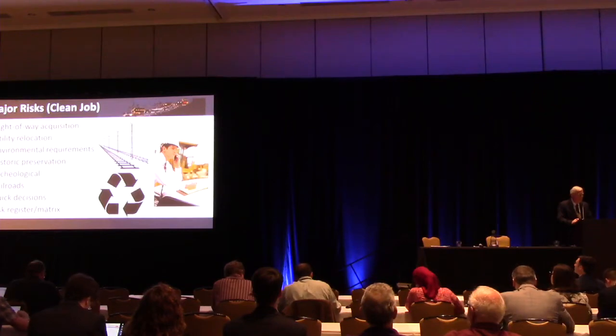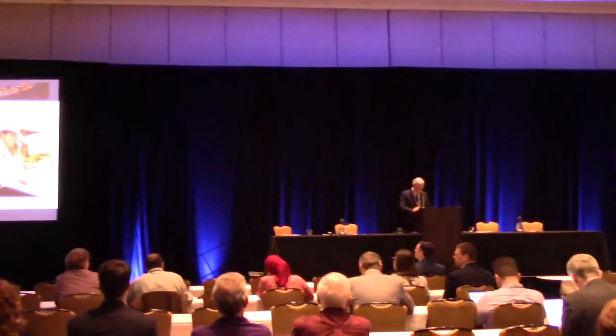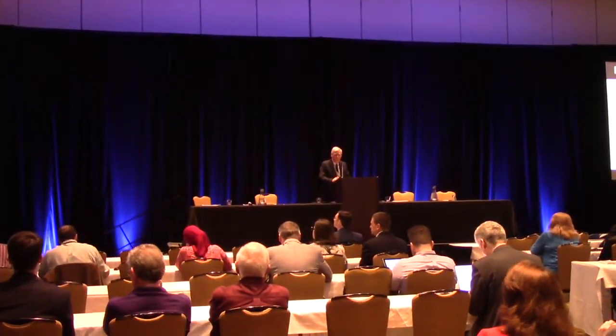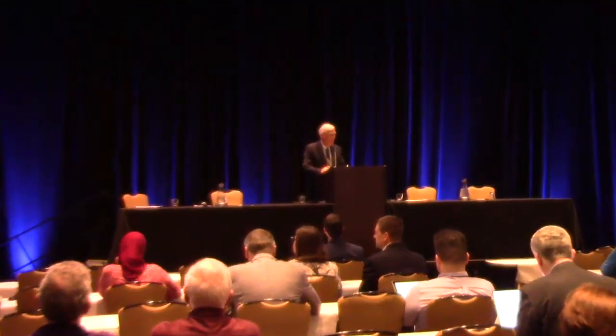If you have an issue that arises, resolve it. Get it taken care of or move it up the ladder in a very quick fashion. And some of them are using risk registers or risk matrices to anticipate what's going to happen and have a resolution in mind before it even happens in some cases.